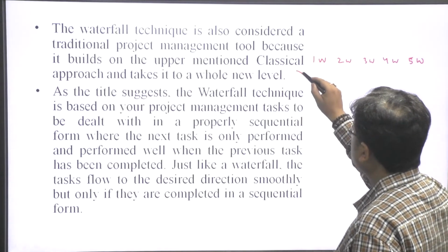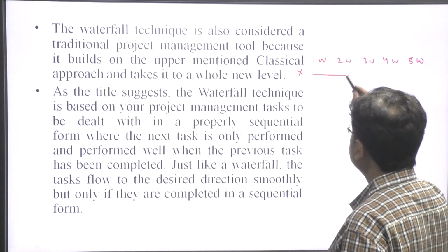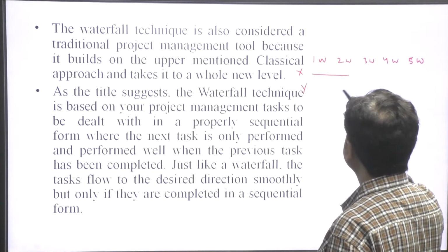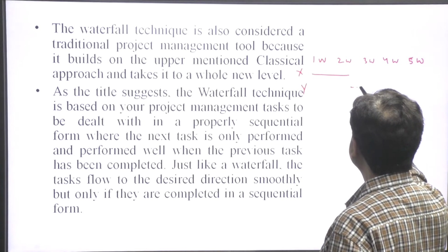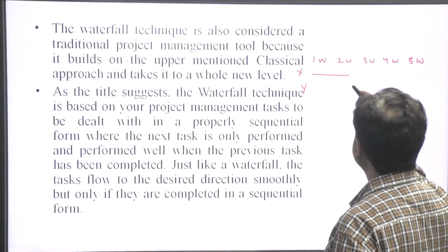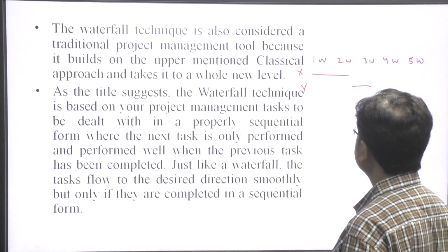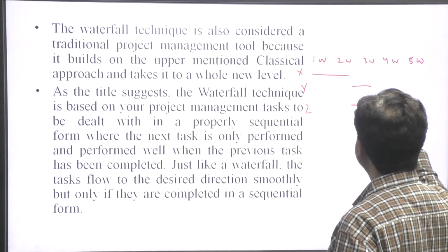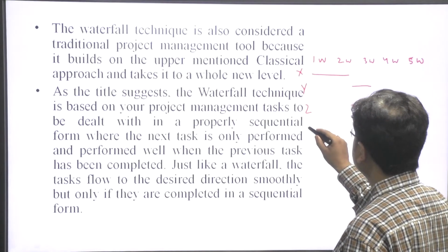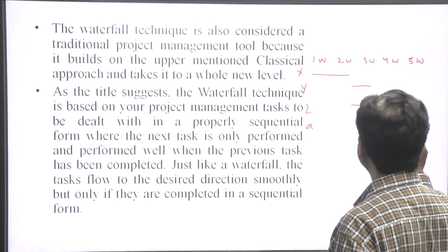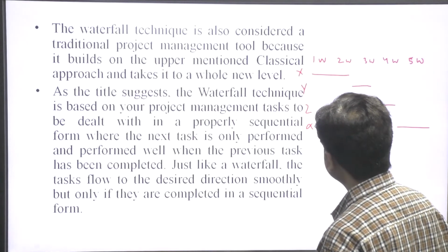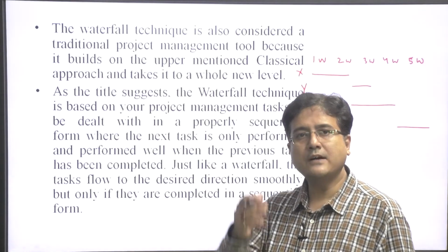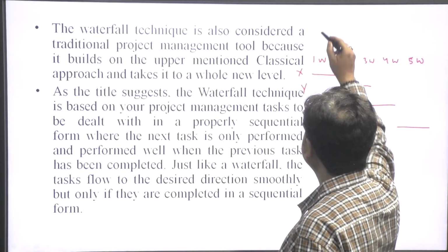Any task X is started and completed by the end of the second week. Task Y is completed after the completion of the first one. Task Z may move parallel and go to the fourth week. So, this is a kind of sequential work which we use, just like a waterfall, as we saw a waterfall like this one.